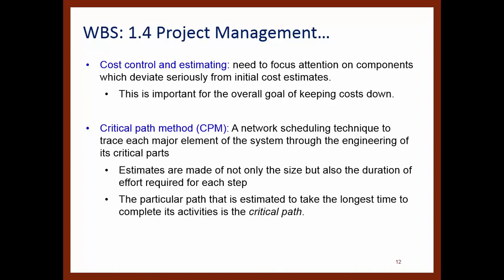So when you start a new development and you're planning for your budget, you are always recommended to have some extra amount being added to that project development in case something doesn't go as expected. So that's when you try to manage that uncertainty. If you're part of the development or the construction of a new building, you know that there are things that can happen that are out of your control, like weather conditions and so on.